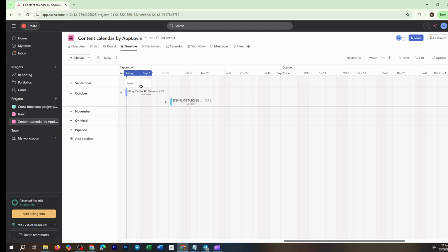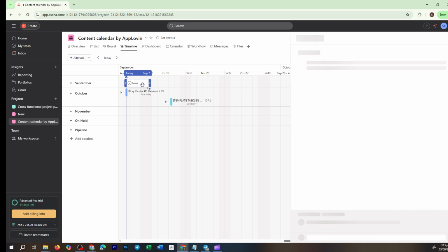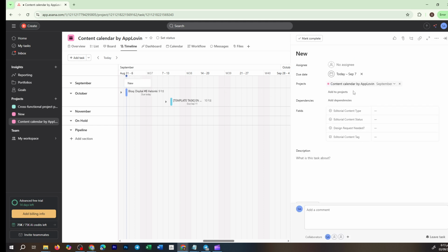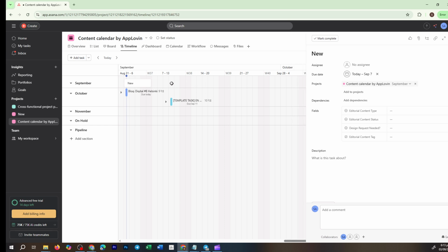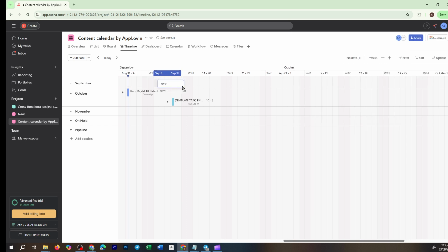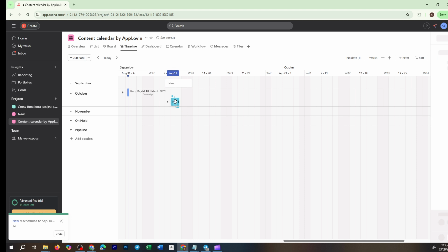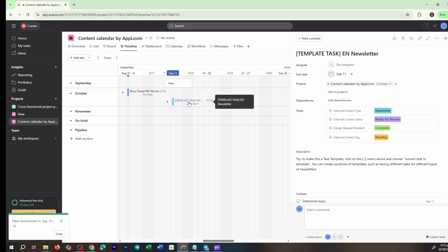Once you've got your tasks laid out on the timeline, it's time to connect them. Showing dependencies between tasks is key for understanding how they interrelate. And you can do this easily by using the Add Dependency option or by dragging a connector between tasks. When these dependencies are created, you'll typically see them represented by gray lines.